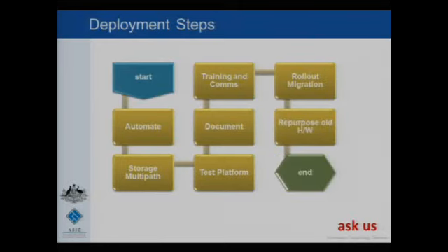I won't delve into each of these, but concentrate on your storage multipathing, test your platform, pull the cables, pull this one, power it down in the middle of the day, do all that stuff. You want to know the adverse effects of what happens in your infrastructure during some type of event. We had to document the solution to raise change requests, these types of things, training and comms. A lot of IT staff were trained.